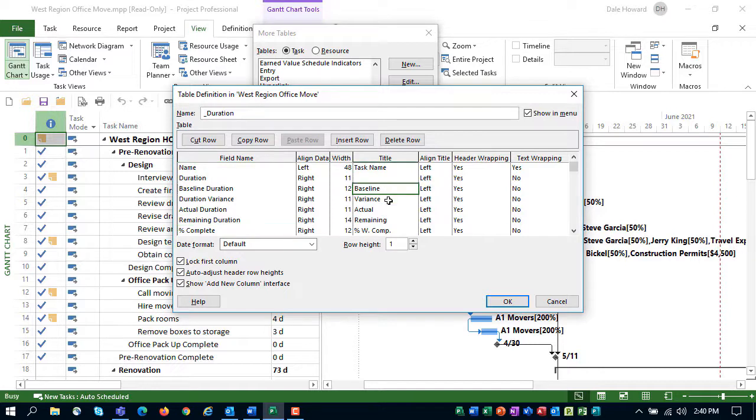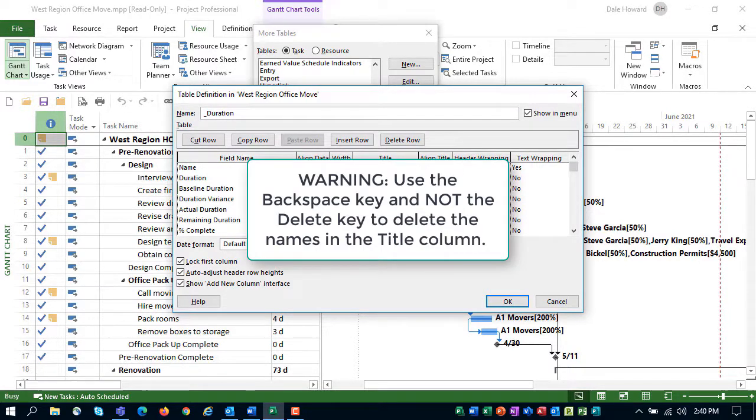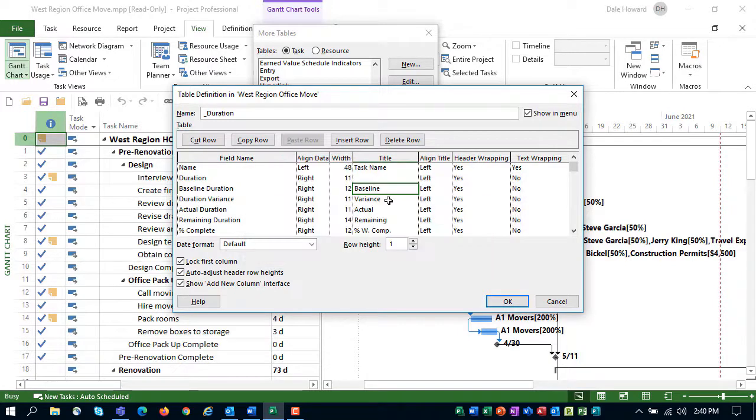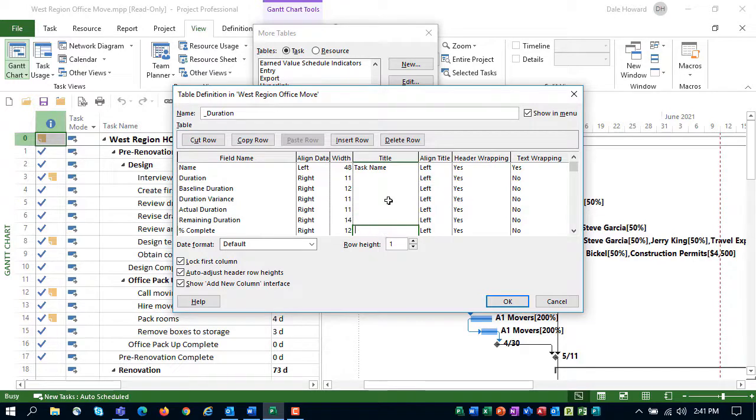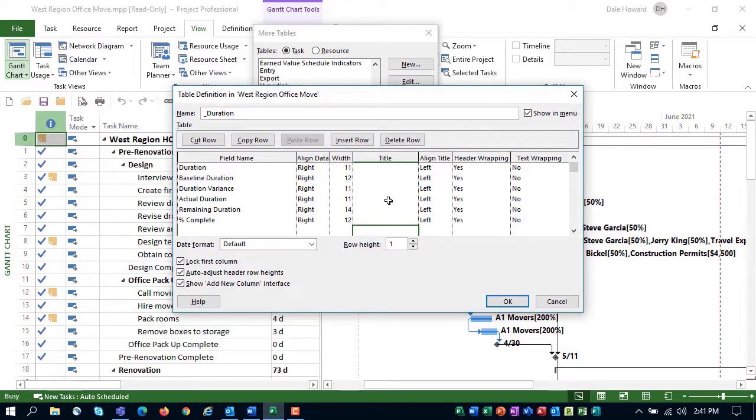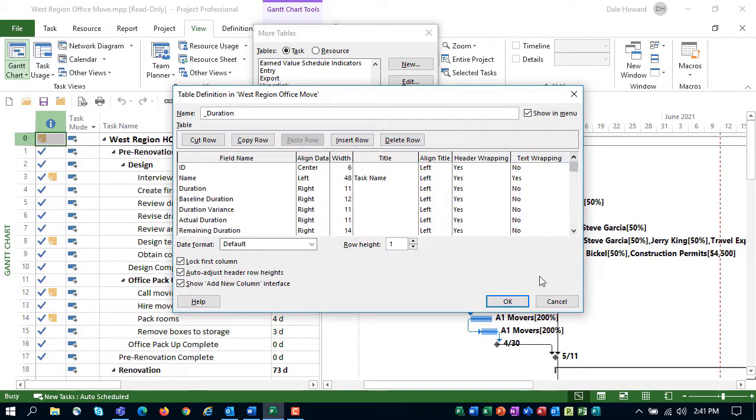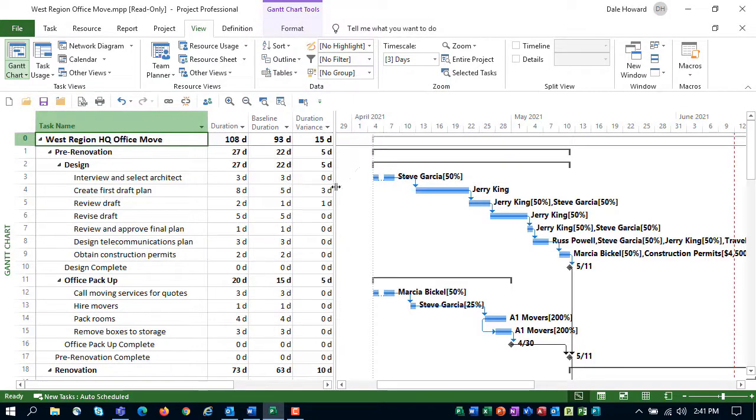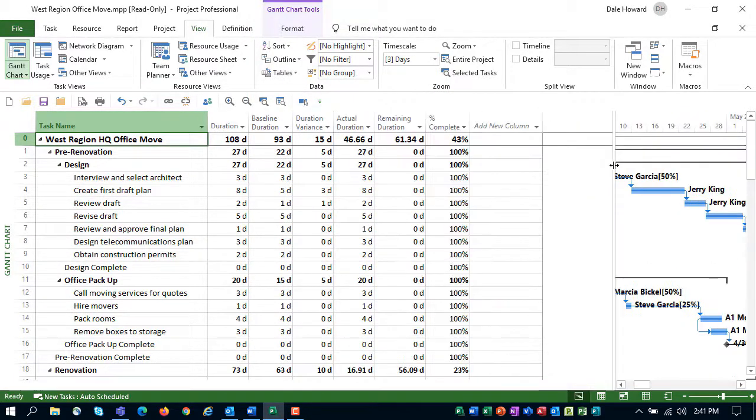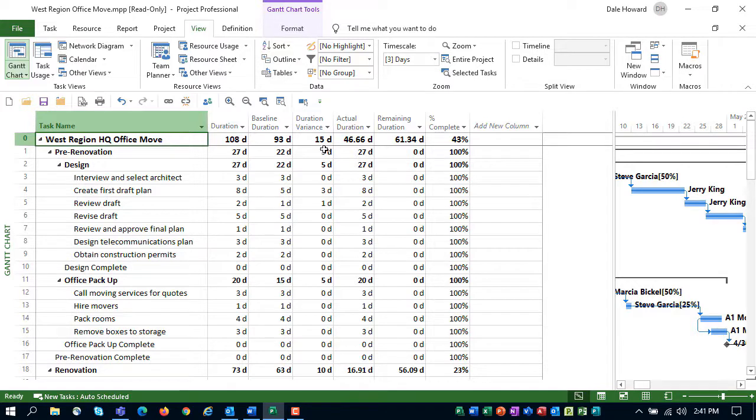Then, in the title column, use the backspace key on your computer keyboard to delete the titles. Do not use the delete key because that will delete the entire row and you don't want to do that. So, I'll select baseline, hit backspace, variance, hit backspace, actual, remaining, and percent work complete. When you've removed those titles, go ahead and click the OK button and then click the Apply button to display your new table. Drag the split bar all the way over to the right so that you can see all of the columns in the new custom table.